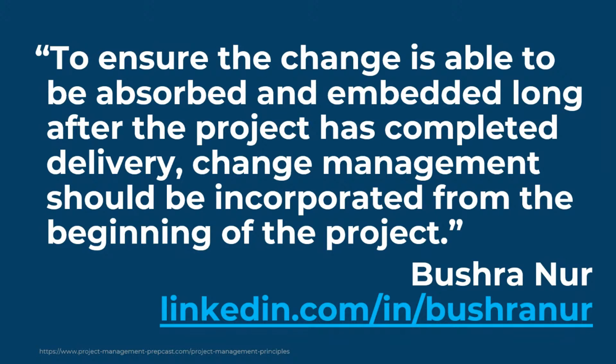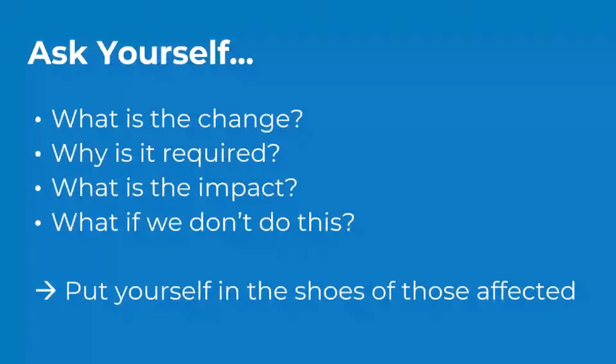It'll also give you an opportunity to go, yeah, how are we going to do this exactly? Right? So ask yourself this here. Bhushan recommends that you ask yourself these questions at the pre-business case stage, and then incorporate them into the business case. First of all, what is the change? Right? What exactly are we doing? Why is this necessary? Why are we doing this change? And how will it impact those who are affected? And I think this is also important. What if we don't do anything? Right? What will be the consequences if the change does not go ahead?